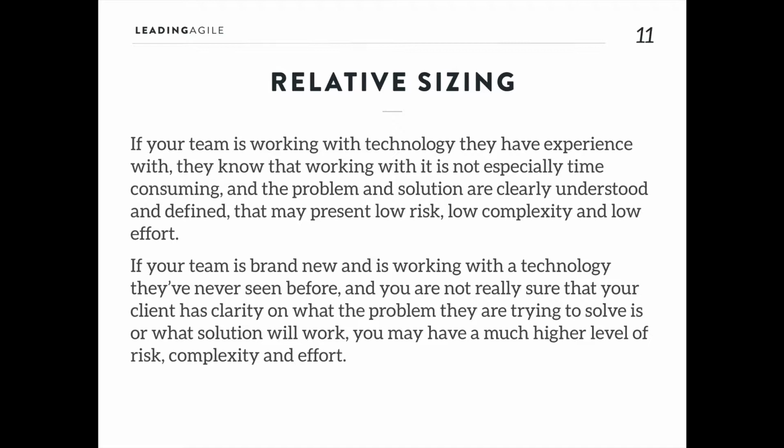But if you're working with a brand new team, people that don't know each other very well, they haven't moved through those stages of forming, storming, norming, and gotten to performing, they're working with technology they're not familiar with, the client may have told you what they want, but you're not really sure if the client actually understands what their problem is, that's going to increase your risk, your complexity, and your effort.